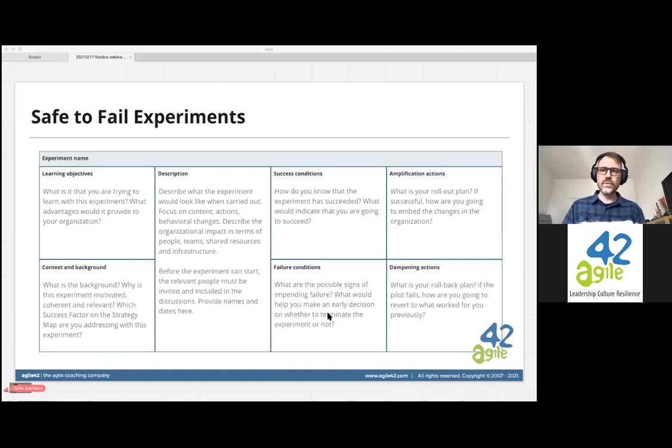So it is no use if we have scheduled this for, let's say, 3 sprints or 4 sprints to run for 2 months if we already see after 1 week or 2 weeks that this is not going anywhere. Then we can just pull the big handbrake and say, sorry guys, let's terminate this. We have learned something valuable, and let's free up the resources to work on something else or experiment with something else.